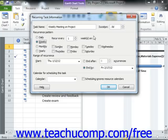Then, in the Recurrence Patterns section of the dialog box, you set the pattern of recurrence for the task. The choices shown depend upon whether you chose to set a daily, weekly, monthly, or yearly pattern.